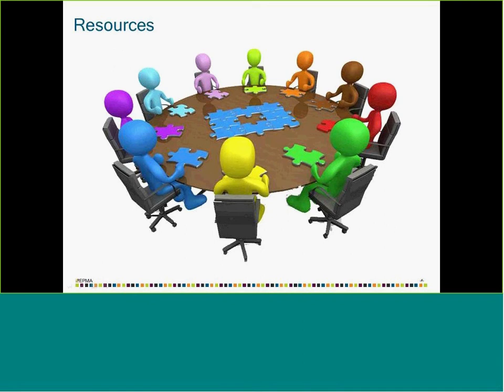The other way is, instead of assigning resources to your project, if you don't want to do that right now, you can create a high-level resource plan, and this resource plan basically reserves the resources for a predefined period of time. Temporarily reserves these resources. So you can do it either way, and portfolio analysis picks up whichever way you want to do this in. So once you have your resources defined,